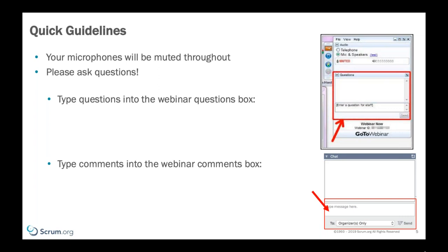If they give you feedback after the sprint review, then you can't get it into the current sprint. You've got to get it into the next sprint. So if you're doing 2-week sprints, that could be 4 weeks away before they see that change. But if they can get that feedback to you during the sprint review, then maybe you can show them the outcome in 2 weeks, because that's the most important thing to change, or it's a small enough difference to be able to implement it very quickly alongside the work for the sprint goal, and just get that happy user, happy stakeholder. And that's the thing to focus on to get them to come back.